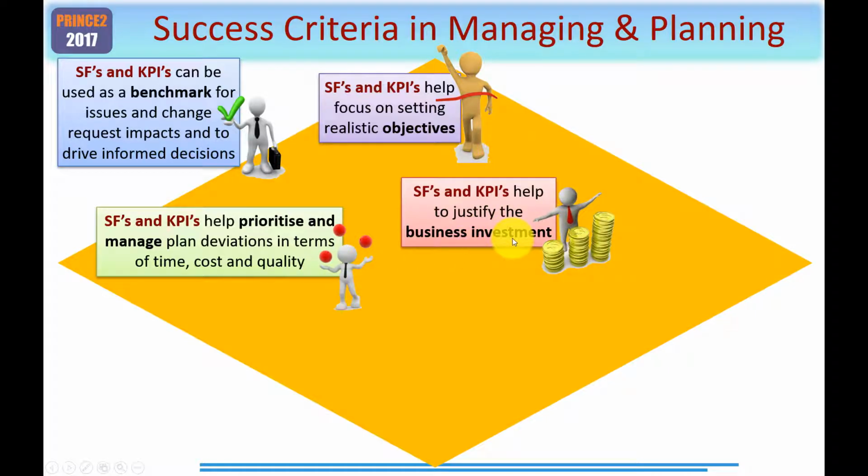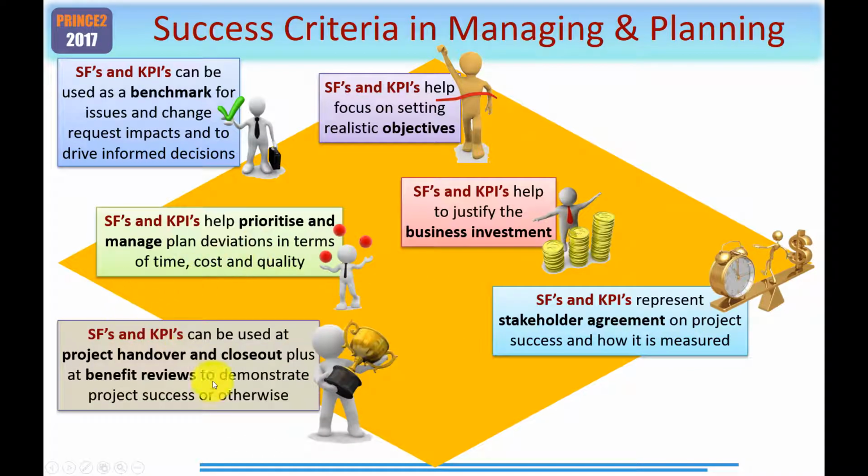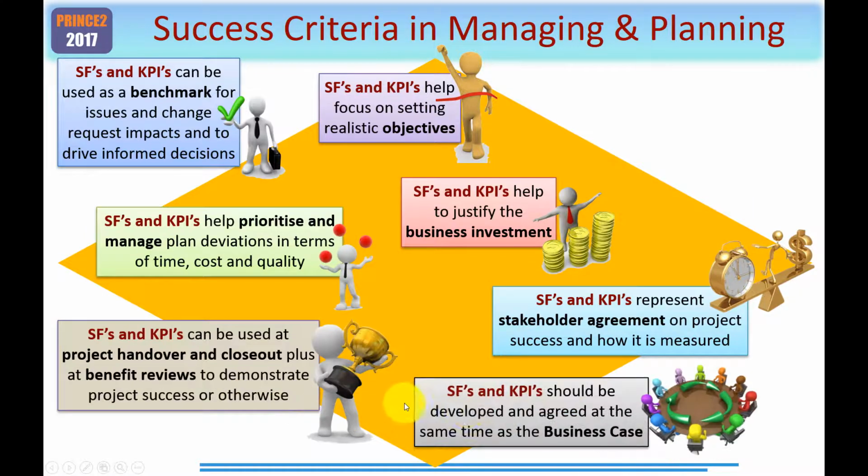So the PRINCE2 business case, along with its investment appraisal, would be helped by identifying and harmonizing with any success factors and key performance indicators. They represent stakeholder agreement on project success and how it's measured, so there's no ambiguity here or difference of opinions. They can be used at project handover and closeout, plus also at benefit reviews to demonstrate project success or indeed otherwise. They should be developed and agreed at the same time as the business case. That ties in with the point I've made up here, because of course they help justify the business investment.